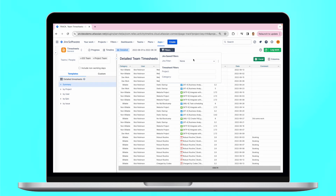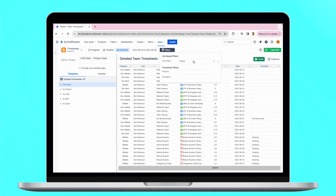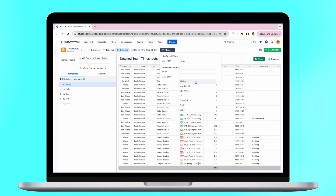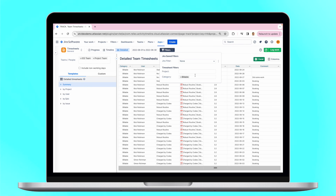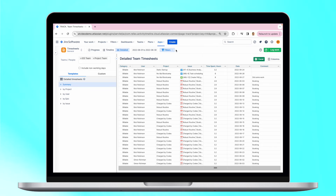Use Jira filters in your timesheets. Distinguish billable and non-billable hours as well as other types of logged time. Save timesheets and export data as an Excel file for further analysis.